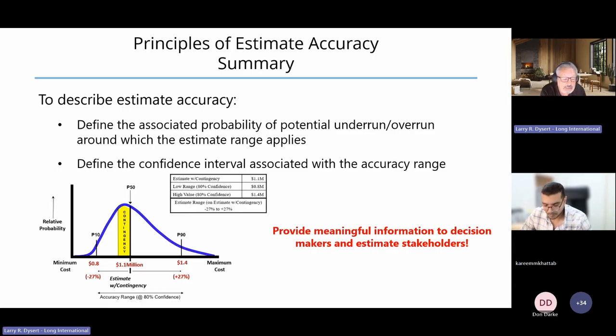But as we go through our stages of project development, as we move from class 5 to class 4, by class 4 we typically have a near final complete equipment list. And we've done heat and material balances, and we have process flow diagrams. So from a project team perspective, anything that significantly changes any of those key defining engineering and key defining planning deliverables is a change that may require funding not out of contingency.